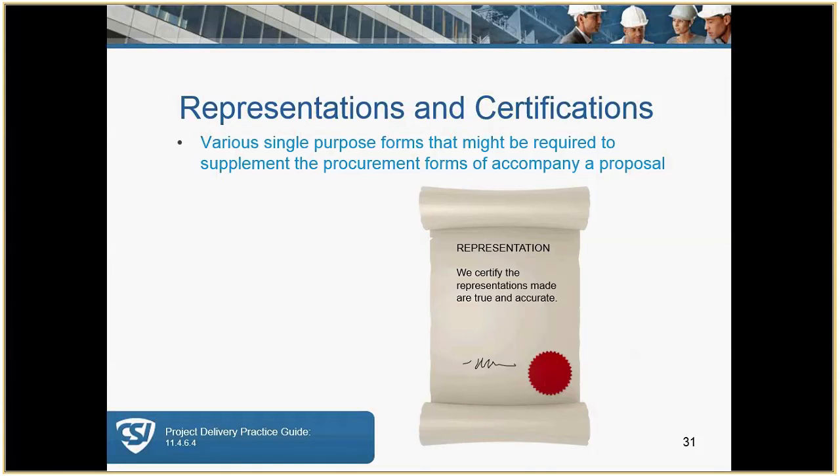Reps and certs. Basically, you're certifying that there's no collusion, and you certify that the business entity is licensed to perform the work.